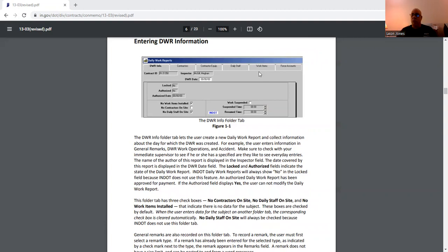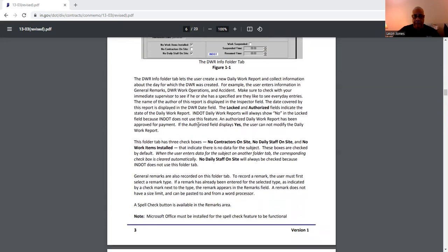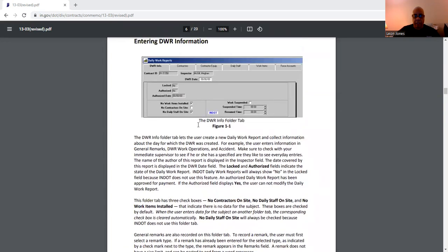Well, here in Indiana, the proper workflow should go up from the PE/PS to a contract, or I call them a change order specialist, to your AE, and then to your district, your DCD. I think that's what they call it here. Your district construction director. Again, here's what SiteManager looks like.